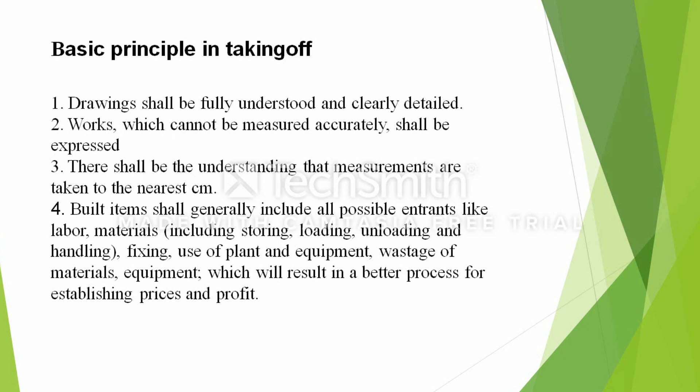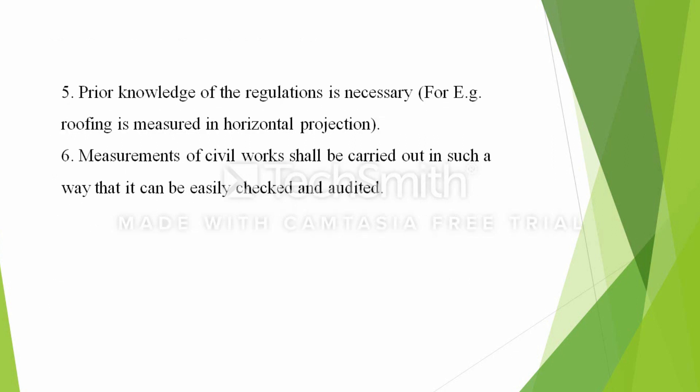There shall be an understanding that measurements are taken to the nearest centimeter. If you want to make it accurate, you can use the drawing. Bill items shall generally include all possible entries like labor, material, equipment, loading, and storage — everything that you want to make accurate. If everything is adhering to the drawing, you can include the drawing.